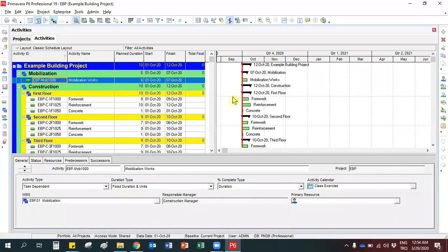In the previous parts, we learned how to define a resource dictionary in the P6 database, and we defined formwork, crane, and concrete worker resources. Now, in this part, we are going to assign these resources to the related activities in the project. In P6, you can assign any resource to your activities as long as it is an active resource in the dictionary. And there is no limitation in the number of resources assigned to an activity.